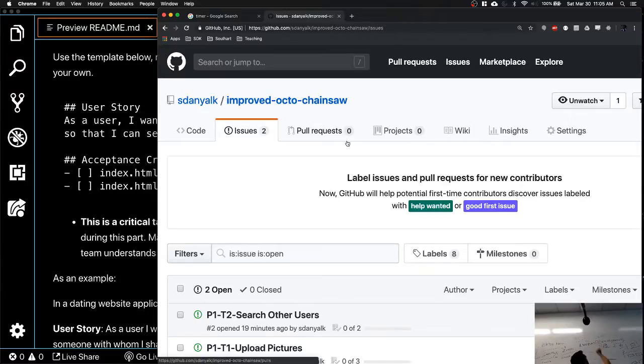I'm going to research on my API, and this is my user story. I have to go and look up, let's say, the Spotify API. Okay, so my user story is, as a user, I want to see how to use the Spotify API. All right, my acceptance criteria is I'm able to successfully call the Spotify API and successfully get the results back. All right, in 2 weeks, I'm going to work on that story for just like 2 days.